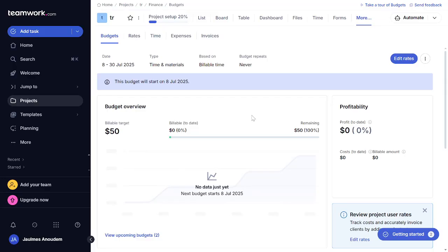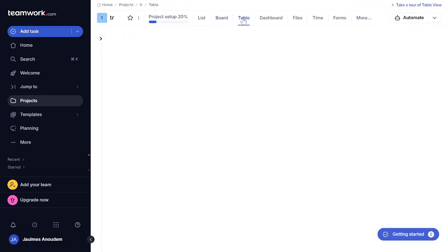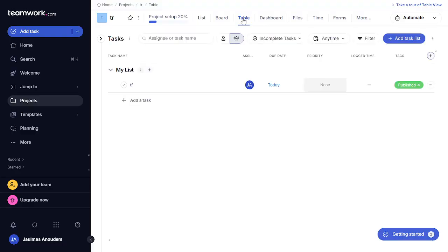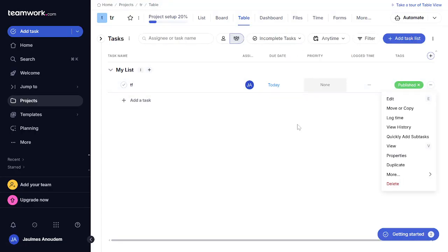take corrective action. Lastly, if an overrun does occur, use the Reschedule tool under the Plan tab. This tool allows you to shift tasks and deadlines to accommodate the overrun and mitigate its impact. Let me explain why this matters. It helps you to manage the situation proactively rather than reactively, reducing the overall impact on the project.